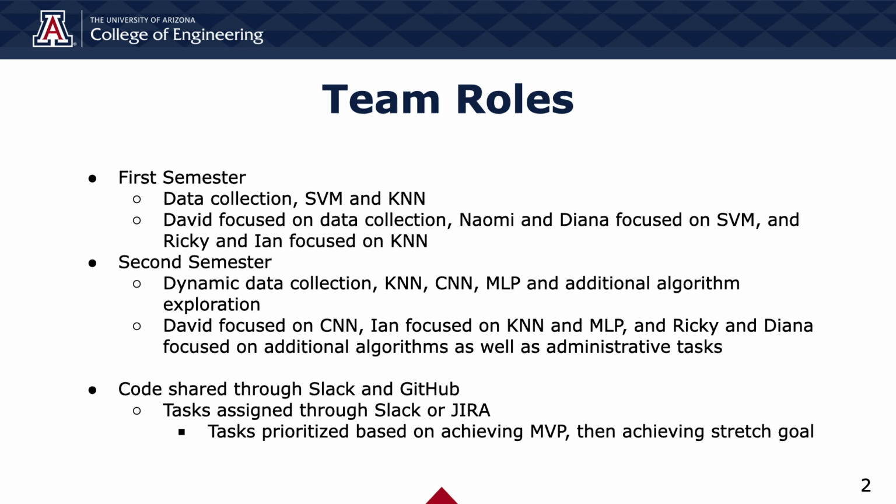We divided both technical and administrative tasks equally and found throughout the course of the year that our team functioned best when we sped up the traditional 2-week Agile Scrum and met twice a week instead. We kept track of our tasks and code through Jira, Slack, and GitHub.